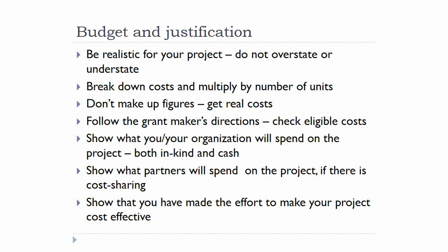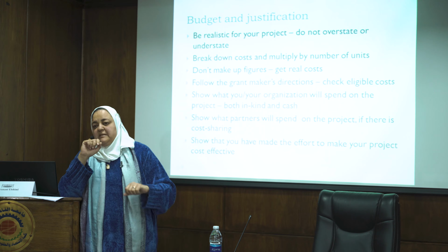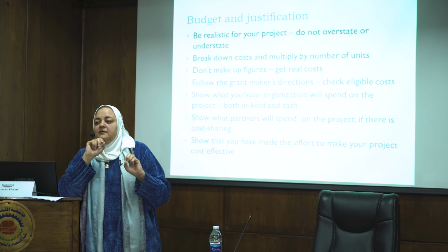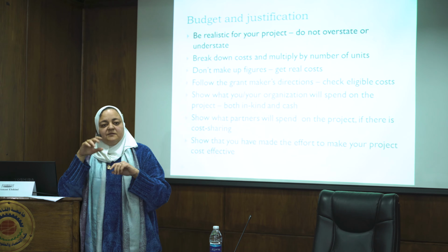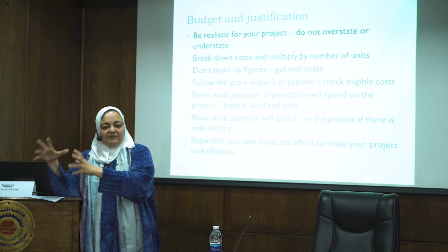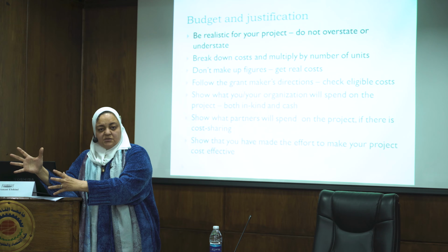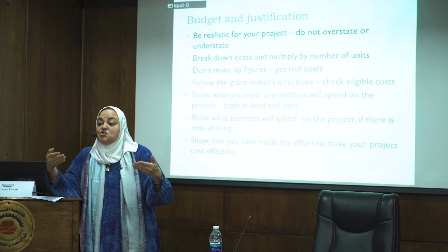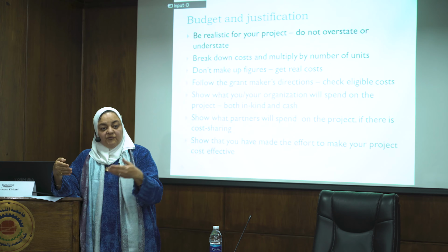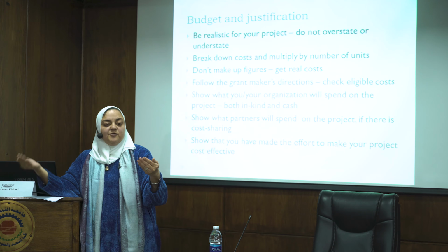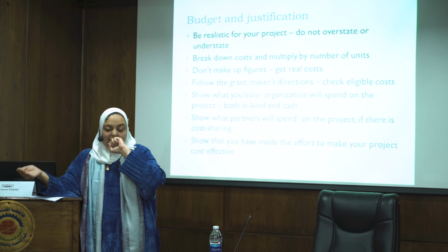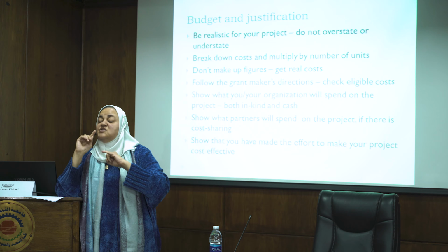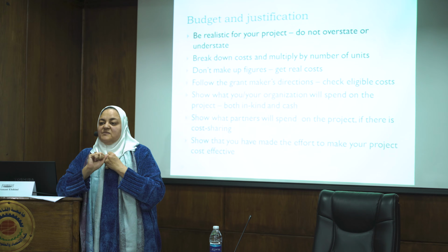A couple of other tips, okay? If there is cost sharing, you need to show it. So if you are getting, for example, the airfare and the travel expenses from one organization and accommodations from another organization, you need to show on your grant proposal for each organization who the other donor is and what they are covering, so that there is no double